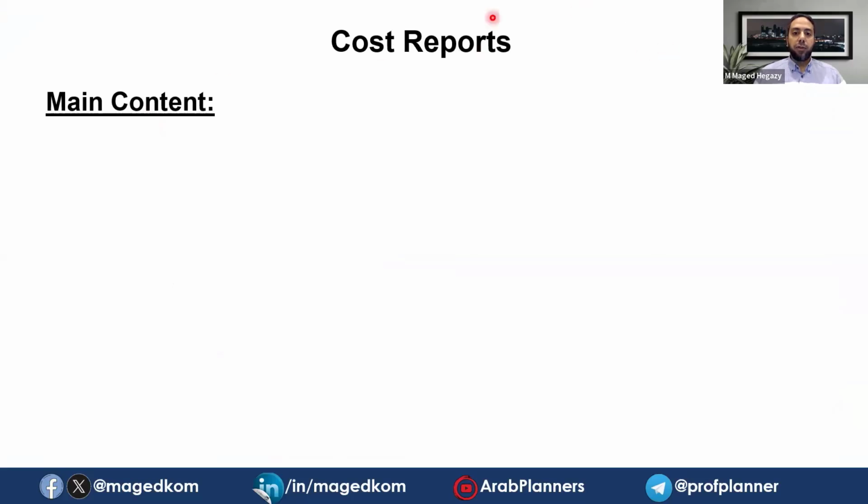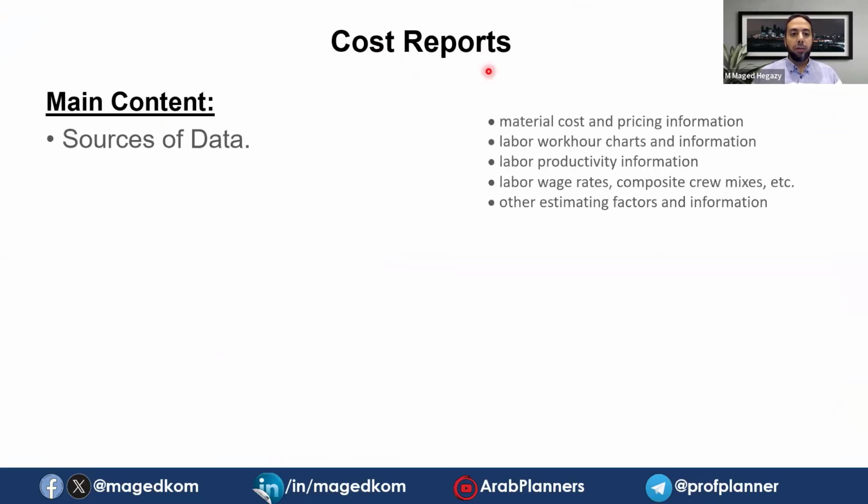One of the main things cost engineering does during construction is cost reports. These cost reports need to consider the sources of data, the pricing information of everything, and the status of the project with productivity information, rates, and estimation factors.